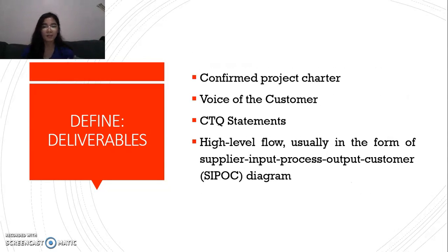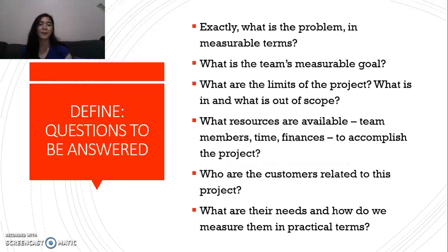So next, you also have to define your deliverables: the confirmed project charter, the voice of the customer, CTQ statements, and the high-level flow, which is usually in the form of a supplier, input, process, output, and customer diagram.